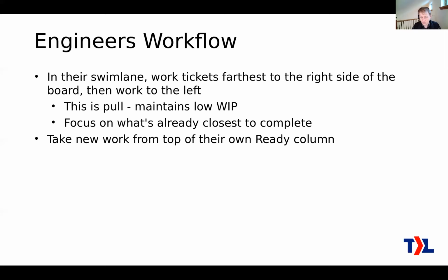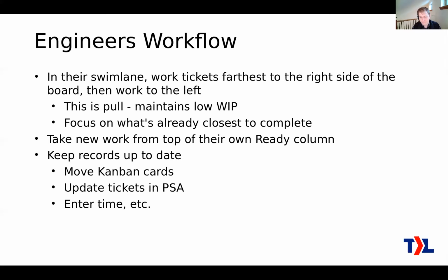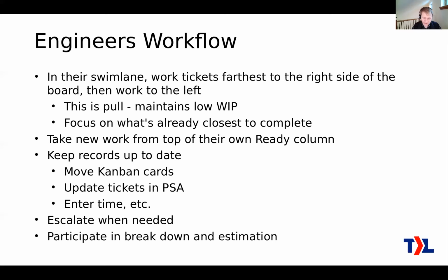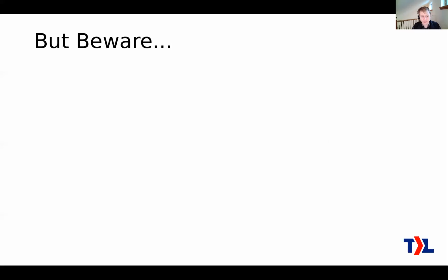When they are ready for new work, then they take from the top of their own ready column. So you would have gone in there and ranked those from top to bottom, and so they always take from the top. And also, engineers are keeping the records all up to date. They move the Kanban cards, they update the tickets in the PSA, they're entering their time, all the things that hopefully they are already doing. And they escalate, and as you need them to, they participate in the work breakdown and the estimation.